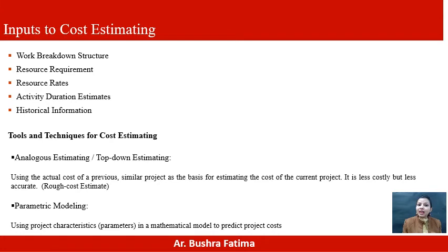Pricing can differ over time, and there can be different estimates at different times. Like one item can be purchased for rupees 3000 in the month of March, but when you purchase the same item in the month of September, the pricing can fluctuate. So you must know the delivery schedule and milestone dates for your project to make an accurate cost estimate. You should know at what time the cost of equipment, the cost of material, and the cost of other things may vary.